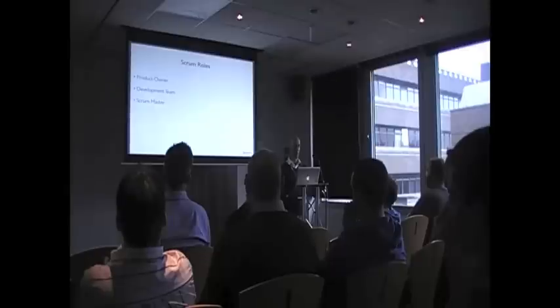And then a Scrum Master, who is not a project manager. He's kind of in charge of removing things that stop the team delivering what they need to do in a particular sprint. They're a kind of enforcer of the rules, so they make sure that you do have the daily stand-up meeting, you are communicating, you are making sure you're going through the backlog list and then making decisions. They're kind of the master of the process. A product backlog, a sprint backlog, and burn down charts.